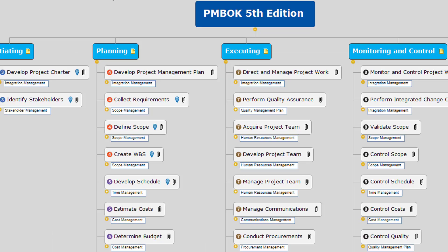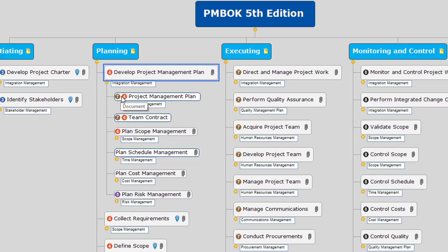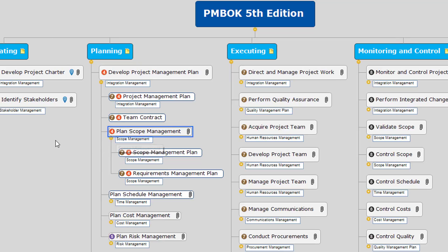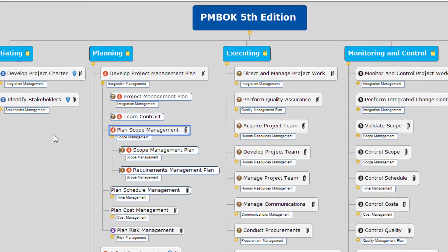The next Mind Map is the PMBOK Summary Map. It's still going to show all of the processes for the five process groups. However, I've organized the Mind Map a little bit differently. In this case, at the third level, I'm showing the process, and I've grouped processes based on where it makes sense. For example, develop project management plan — if I expand this topic, you can see that I've included the project management plan, but I've also included the plan scope management process, and the output is going to be the scope management plan. In the project management plan, you would include as attachments the scope management plan, the time management plan, etc.